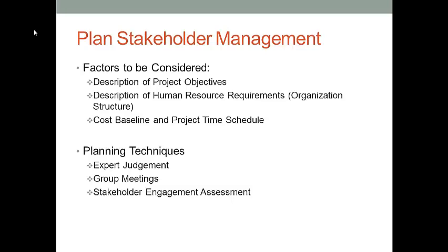Some techniques are available for you when you develop a stakeholder management plan. For instance, you can invite the senior managers from your company to join in an expert panel and use their past experience to develop a stakeholder management plan. The other option is to form some meetings with stakeholder groups and collect feedback from them directly when we develop a stakeholder management plan.